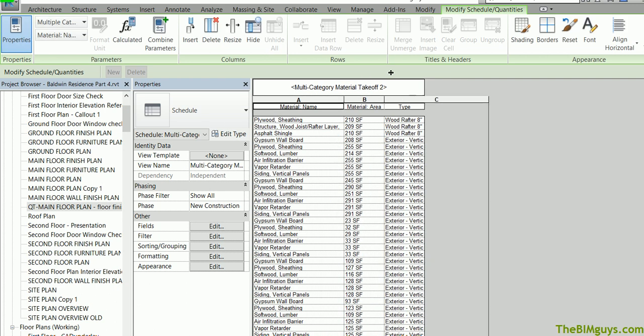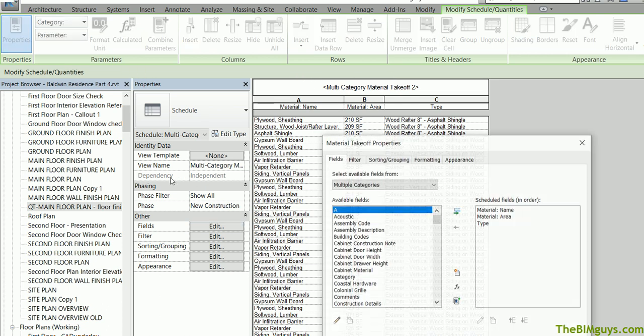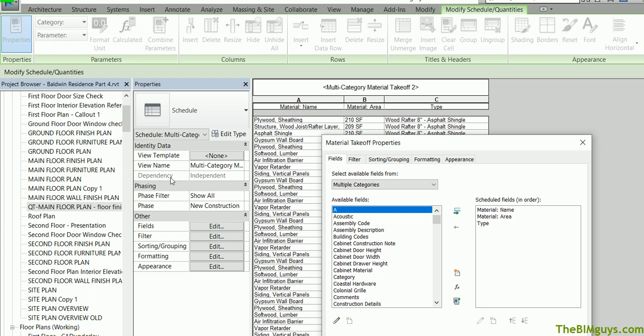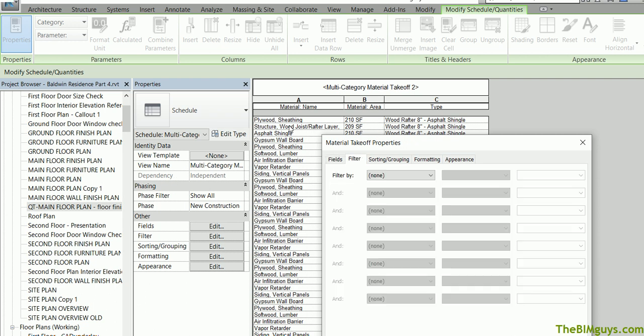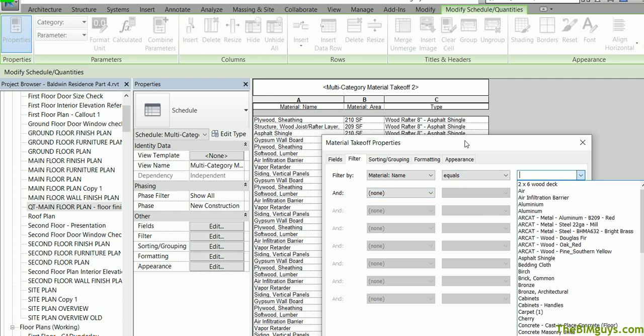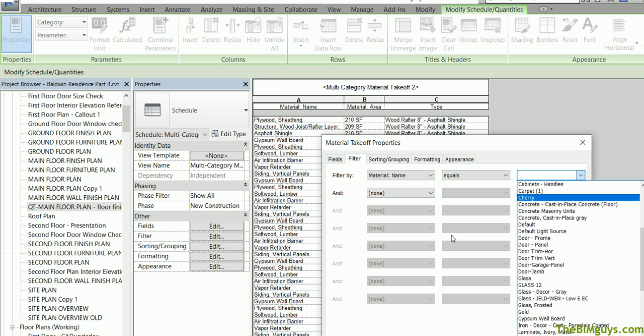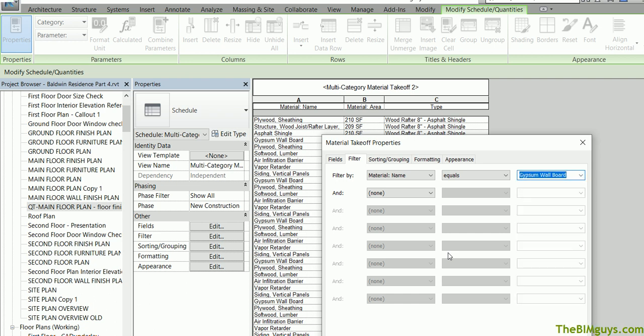I'll now make it a little wider so it's easy to read. Now I only want gyp so let's go back to fields. You can go directly to fields or click on any of these buttons and go directly to the particular tab. If I go to fields I'm going to walk across. I say filter. Now what do I want to filter out? I just want to know gypsum wallboard. So I drop this down, go find the material that has a name, that equals, drop this down, and choose which one you want. This is going directly to the model and choosing all the materials that are available if they're being quantified in this list. Fire it up.